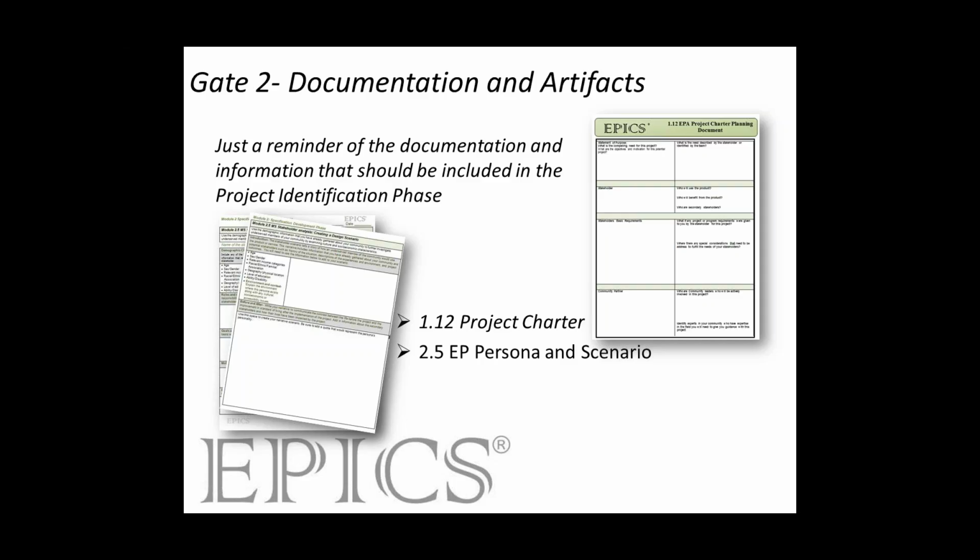Right. Yeah. And the specification design phase, this phase is designed so that you go through building a prototype, getting information back from the stakeholder, testing it, doing some initial testing, and then creating the specifications. And I know that sounds maybe counterintuitive, but until there is some kind of visual prototype, it's hard to really get into what it has to do without getting feedback from the stakeholder.